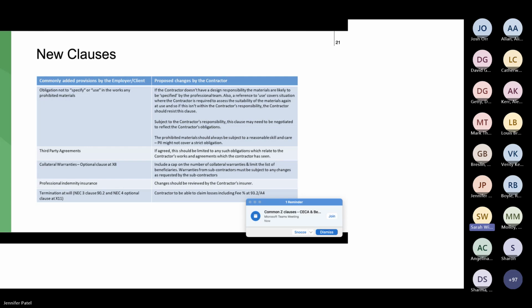That's £500,000 that it should have done, and obviously part of that would be overhead and profit. So this provision allows the contractor to recover its fee percentage with regard to the unpaid balance for the work it hasn't done. So if you haven't done £500,000 worth of work and your fee percentage is 10%, you would get £50,000 as compensation for that, as well as other things.